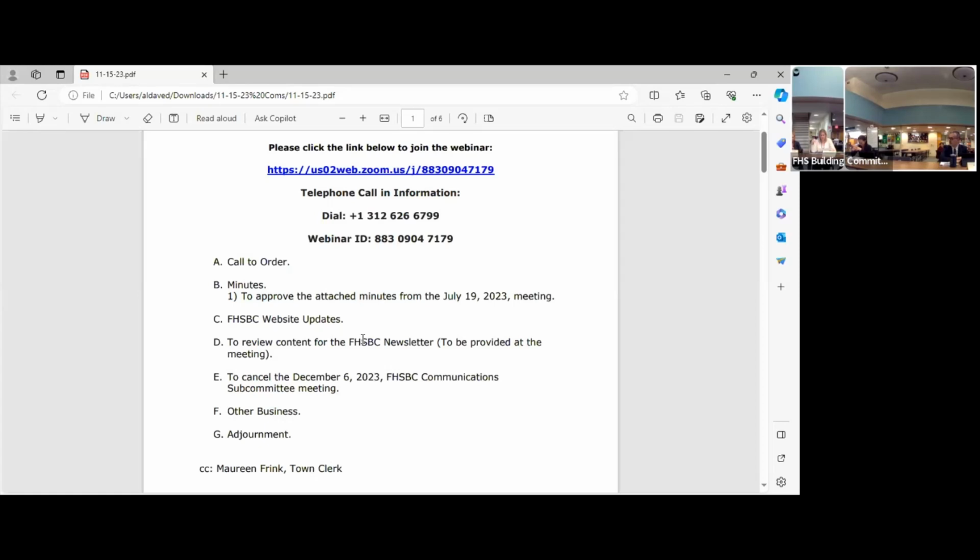So Russ Arnold and I were sitting down thinking about this a little bit, and one cool thing that I don't think a lot of people understand about the way O&G does it is that area A will be done, then B will follow, then C, then D, then E. So it's not going to be the entire building at once, it's kind of like an assembly line. So we verified with George, the superintendent, as of the end of October, the percent complete for each of these areas to show how things are moving. And it's just a quick visual representation of progress.